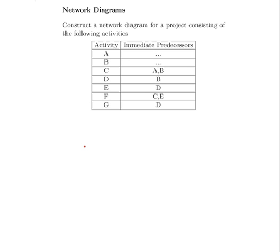And we can see on the list on the right hand side the dependencies. A and B have no dependencies, that is to say they are not requiring any job to be finished before they can get started. On the other hand, activity C requires A and B to be finished before it can proceed.